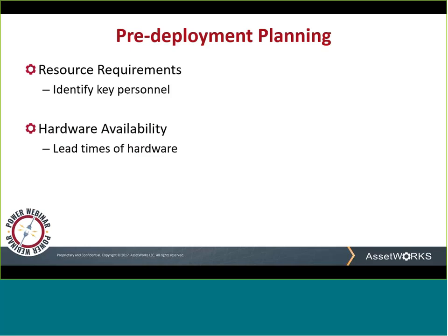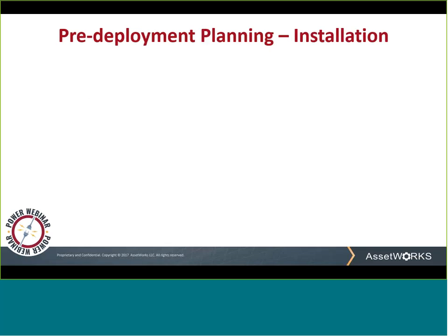Hardware availability is a big one. With the ELD mandate fast approaching in December, lead times are increasing. Make sure you know what the lead times will be for any hardware required. If you're looking at buying your own device, what are those lead times? Consider this. If 80% of the companies leave it until the last minute, you will be fighting for the supply of hardware. In addition to ordering hardware, that hardware has to be installed.